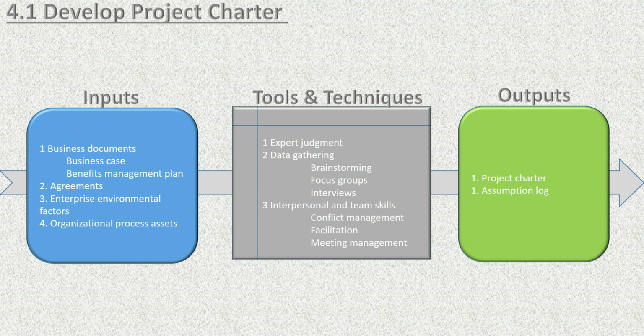You find some issue, document it in the issue log. You are making some assumption, document it in the assumption log. You are finding some risk, keep it in the risk register. You want some change to be done, go with your change management plan and change register. Okay, so nothing goes undocumented and nothing should go undocumented in project management.